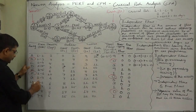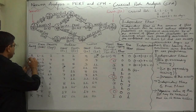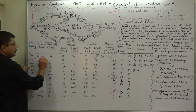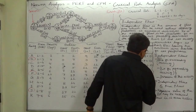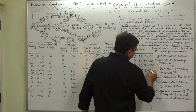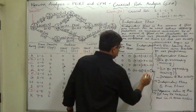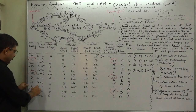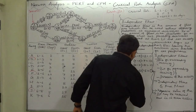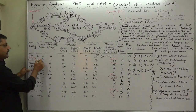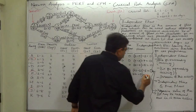Activity D (2,5): its successor is I, whose earliest start time is 13. The predecessor of D is A, and A's latest finish time is 11. So: 13 minus 11 minus duration of D (3) equals minus 1. Since negative independent float is taken as 0, independent float of D is 0. For activity E (3,5): its successor is I with earliest start time 13. Predecessor's latest finish time is 7. So: 13 minus 7 minus duration of E (6) equals 0.